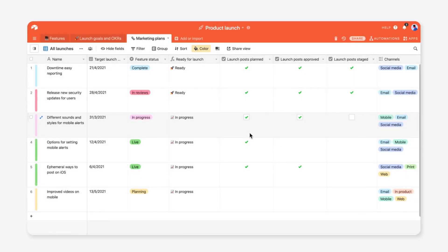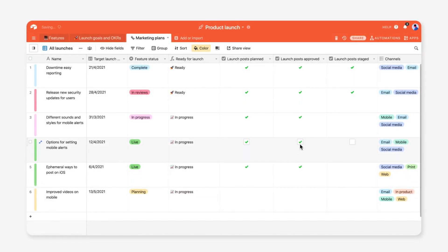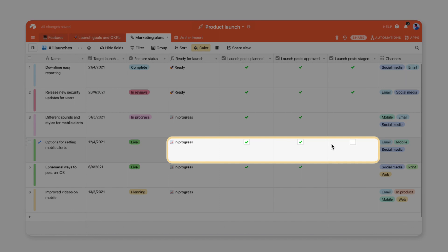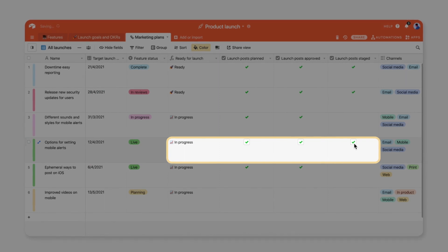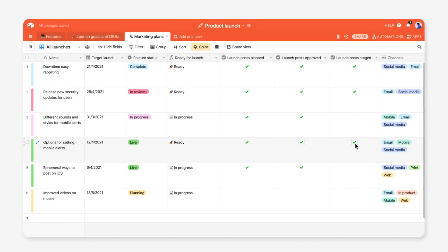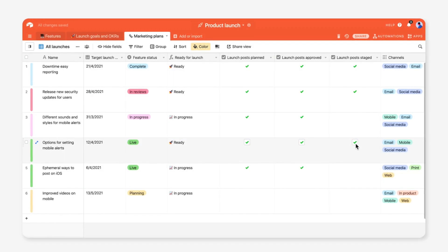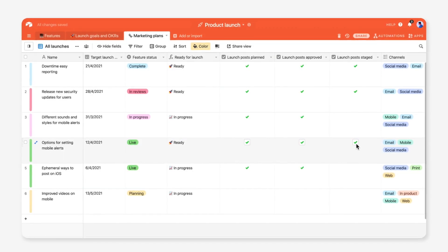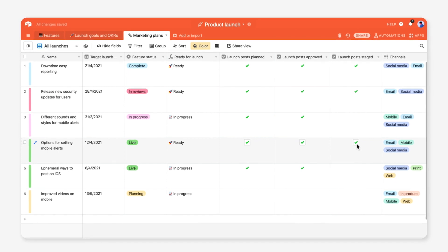Check off every milestone in your marketing plans table to prepare for launch. As your launch assets move from planned to approved and staged, you can track progress to make sure each asset is completed on time.